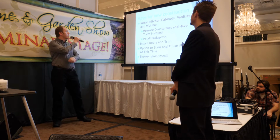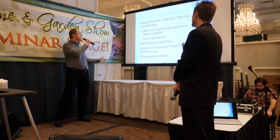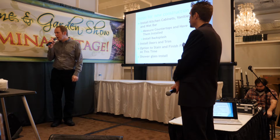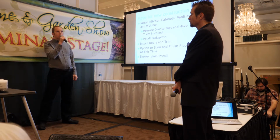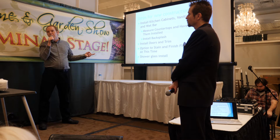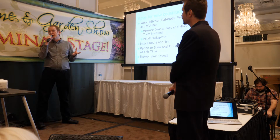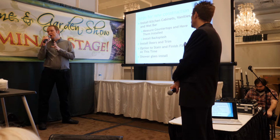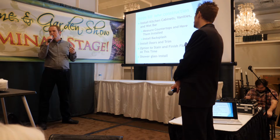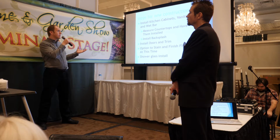All right, so at that point you want to go ahead and install your kitchen cabinets, vanities, a wet bar, and then have your countertop contractor come out and measure the countertops. One thing we didn't mention is when the drywall goes up, have your final measurements for the cabinets. We initially do the initial measurement, and then you want to do the actual measurements once the drywall is up. If you're getting custom cabinets made, you want them to come out after the drywall's up.